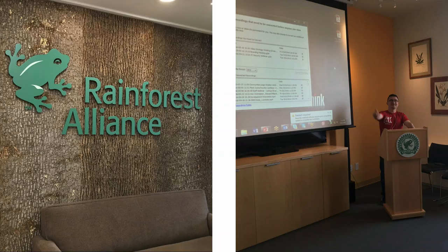And what that allowed us to do was figure out what size, what capacity we had per sprint, and we put a number on that. And then we were able to say, well, we need all these cards. These cards should not add up to more than that number per sprint. So we were able to pile up the cards into basically sprint piles. And in this way, we started forecasting out what could we possibly fit into Sprint 1? And we could even have conversations about if we do these things in Sprint 1 and 2, that's going to set us up to do these things more easily in Sprint 3 and 4 and whatnot.